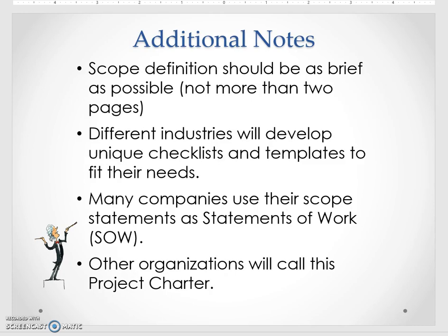So a couple last things about the scope statement. You want it to be brief. We don't want it to be more than 2 pages. Because again, this is a preliminary. It starts us off. Different industries are going to have different things that they focus on. You'll see scope statements called statement of work.